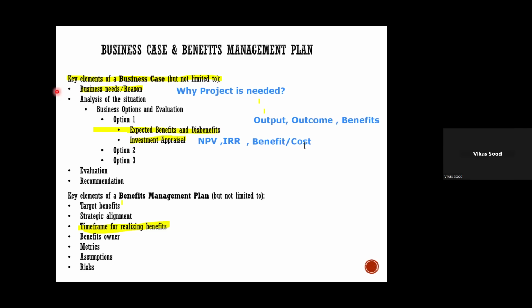Right, right. I don't want to confuse you, but when you do projections, can projections go wrong? Yes, absolutely. So, when you do NPV, you don't do NPV only. You do expected NPV, and you multiply the factor of risk also, the probability of success also, right? We'll study expected monetary value analysis while doing risk management. So projections are always considered with some risk involved, right? Because they're projections.